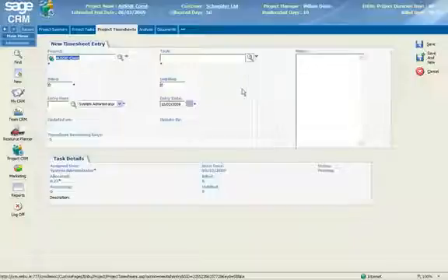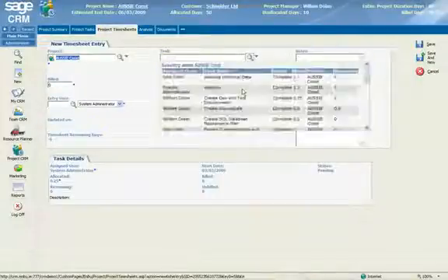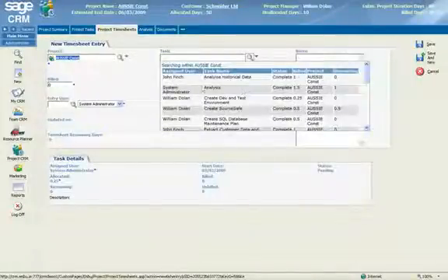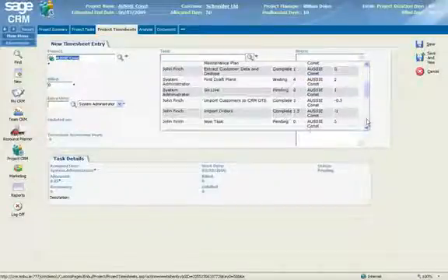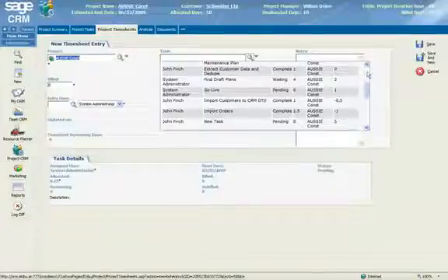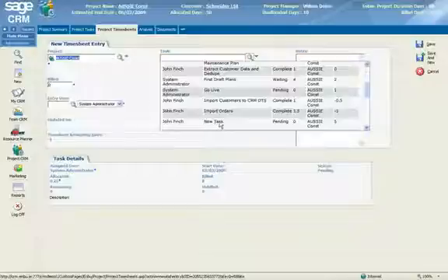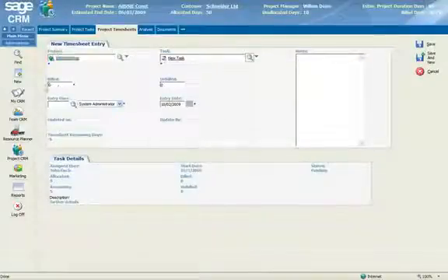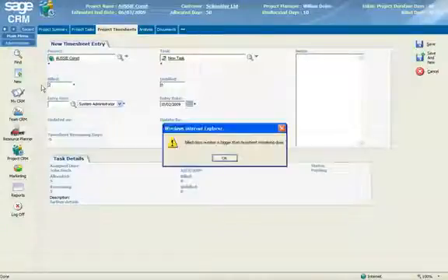We'll have a look at the tasks that are available, and these are all the tasks that are available against a given project. We can see each of the ones that are here, giving you the status of what's complete or not, and also the ones that are pending, and it gives you a breakdown, most importantly, of what days are remaining against these tasks. So we're going to take our new task that we just plugged in, and in this case, we're going to say that we're going to add 2 days billable time against this project. We get a warning immediately to say that for the timesheet that we're currently on, we're actually plugging in more days than is already billed and is allowed, which is a nominal 5 days.